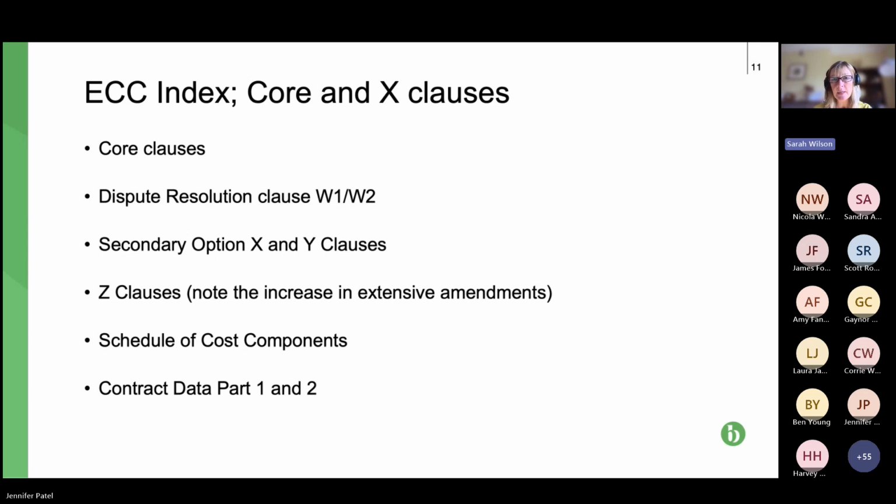So that's supply contract, and some types of construction work do not come within the Act. For example, oil and gas construction work does not come within the ambit. So W1 applies, and that's where you have those strict timescales for adjudicating. So be really careful about that, because if you miss those timescales, you are time barred, and you can't proceed to court or arbitration if you miss the timescales.